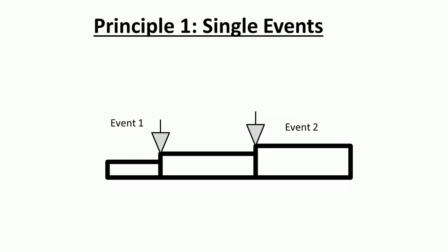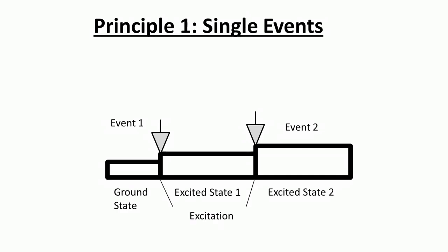The first principle deals with a single event. According to event chain methodology, events occur sometime during the middle of the activity, and this changes the status of the activity. The original state is called a ground state. Other states are called excited states. For example, if the team completes their job, they can move on to other activities. State notion is important because certain events can or cannot occur when the activity is in a certain state. It means that the state of an activity is subscribed to the event.